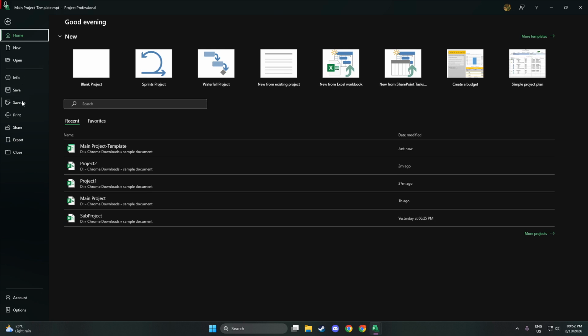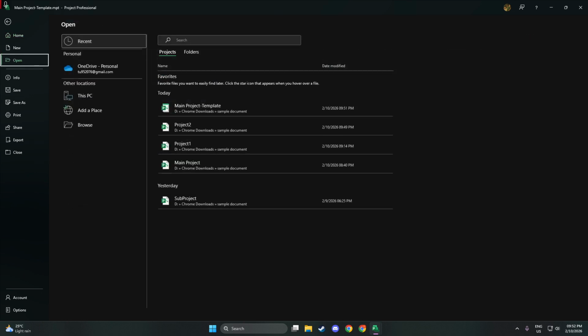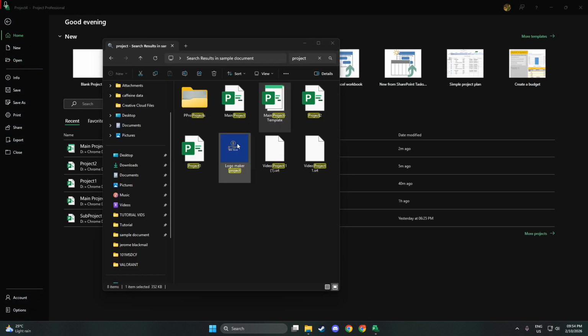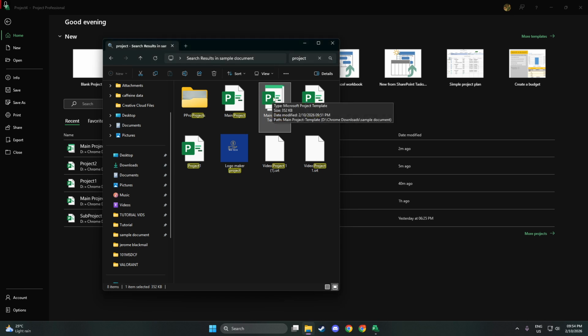From here, tailor the project to your current effort. Adjust the start date to match your timeline, update task durations or effort as needed, and refine resource assignments for the team actually doing the work this time. This step keeps your projects accurate while preserving the consistency your template provides.